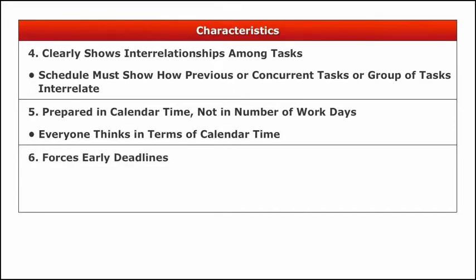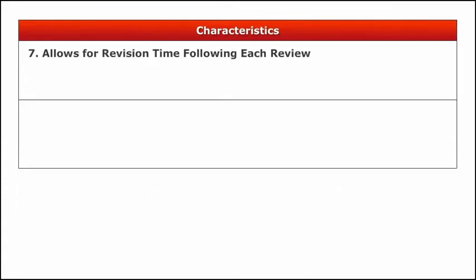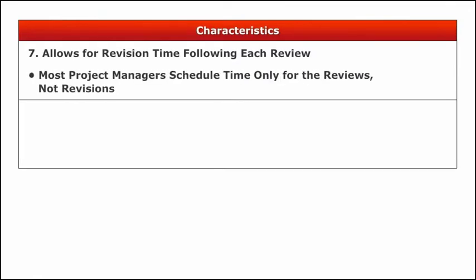6. It forces early deadlines. Tasks will generally expand to fill the available time. Set the clock ahead and give yourself some extra time to clean up loose ends. 7. It allows for revision time following each review. Revisions follow reviews like night follows day. However, most project managers schedule time only for the reviews, not the revisions.